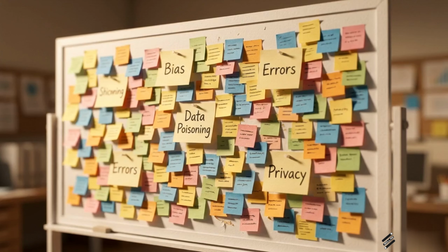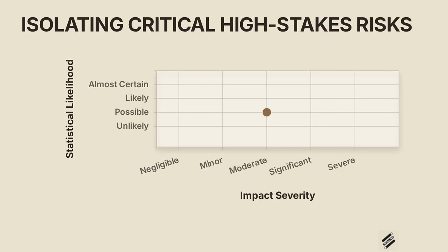The team debates each identified threat. The data scientist estimates the base rate probability of the model failing, while the domain expert assesses the concrete business and regulatory impact of that error. Together, they score the risk and plot it on the grid. The resulting layout dictates the response.